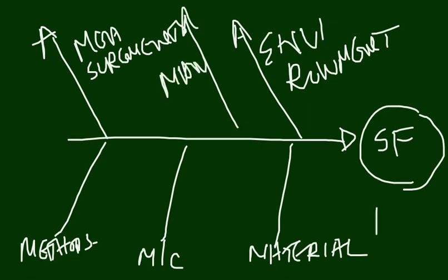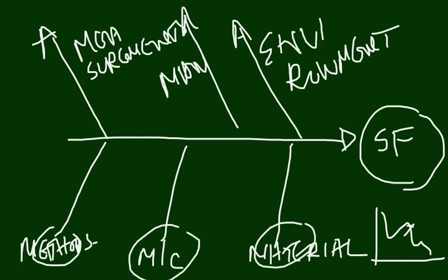So at every crest and trough of the burn down chart, you do a root cause analysis using an Ishikawa diagram and brainstorm with the team along these lines. Is there any problem with the methods? The machine? The material? The environment? The people? The measurement we are taking? There can be a problem with your estimation, story points, effort estimation. There could be problems like network issues. That comes under environment. Maybe a noisy environment, AC not working. Everything can come into this environment category.